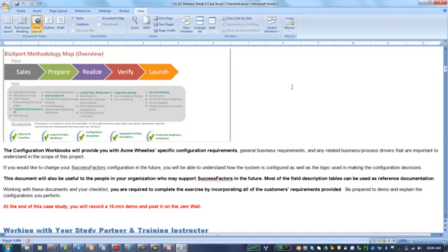Things can go wrong in the realization testing phase, where the systems will not be in sync and there will be some issues arising. To fix that, it would probably take a lot of coordination and effort with SuccessFactors, which might take some time, and because of that it could get delayed as well. So there is a buffer of about a month, and typically 3 to 4 months is what you expect for a project to be finished.